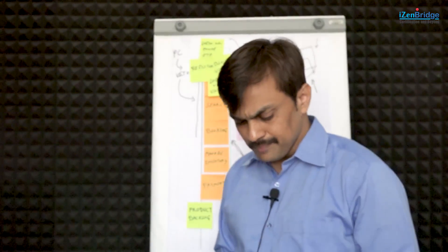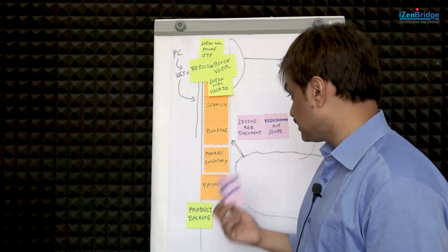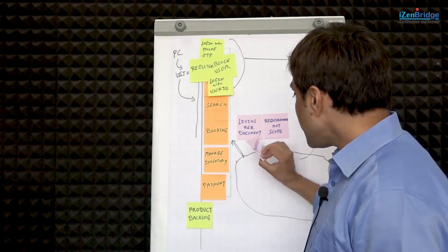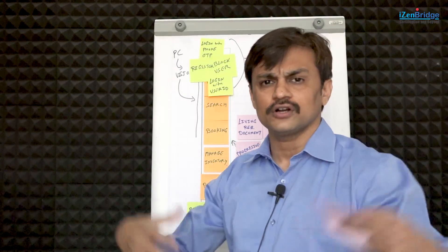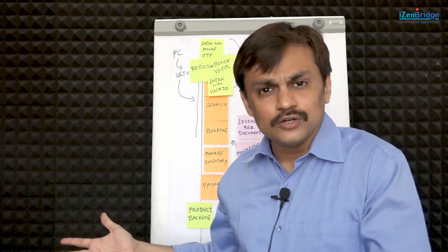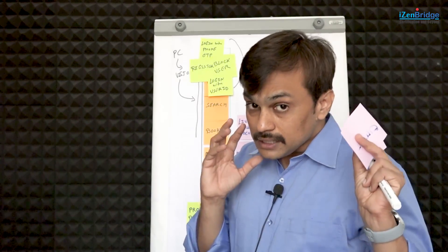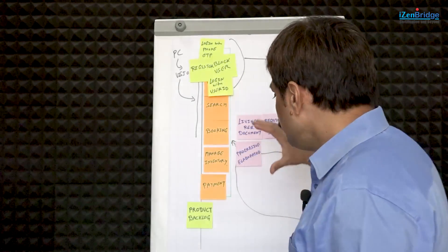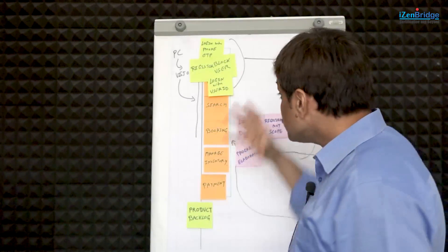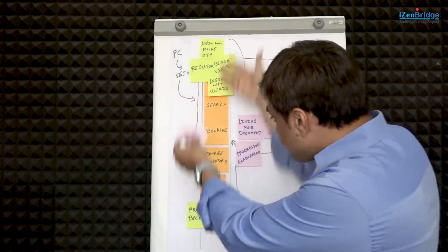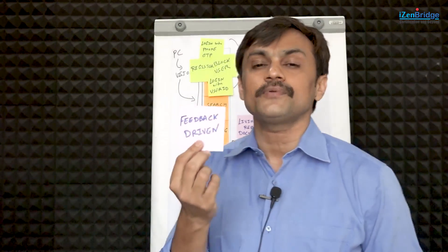It's progressively elaborated. You may wonder: if I have 20 items, why not bring everyone together for 10–20 days and elaborate them all at once? The problem we are solving here is we don't know exactly which requirement will be really valuable, and we don't know how the customer will respond to our implementation. So we don't want to elaborate things before experimenting. Progressive elaboration should be feedback-driven.